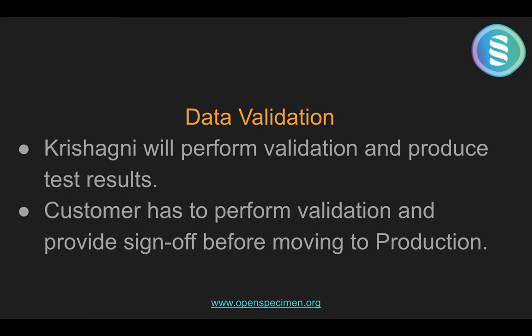Whatever error logs, all such things will be provided in the data validation. Simultaneously, it is your responsibility to perform validation on your own as well. We will expect you to provide sign off before moving it to production.